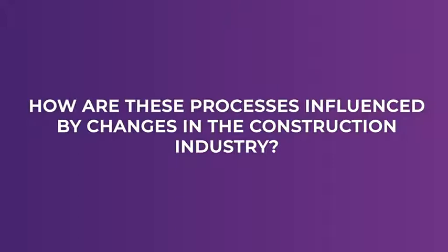One of the biggest things is BIM, which is building information modelling. There are other aspects to BIM, and it's not just a 3D model of a construction job, it's also a process. But from an estimating and measurement perspective, because it's all driven through effectively a sophisticated CAD model, you can take off quantities and it can actually generate a lot of the quantities for you.